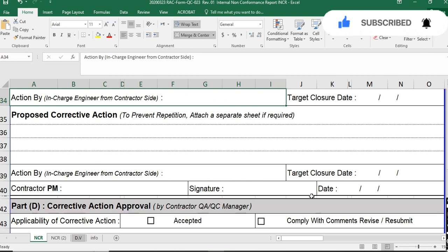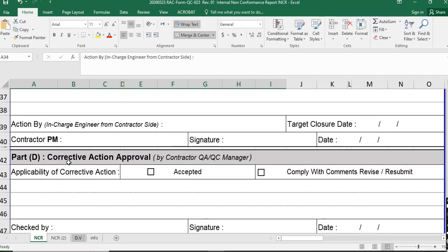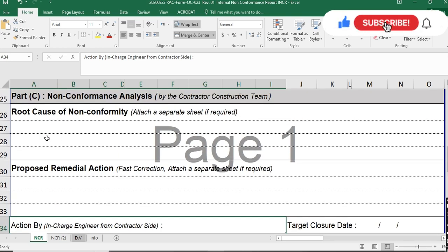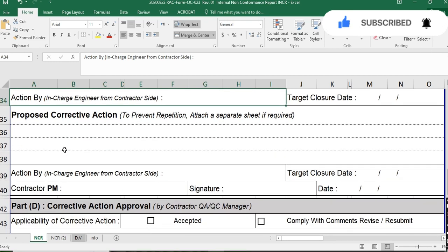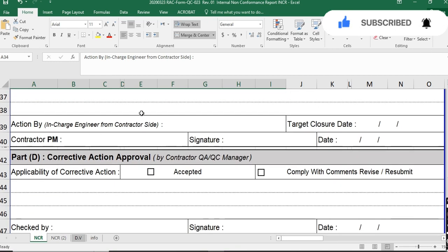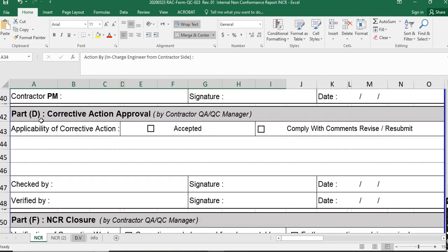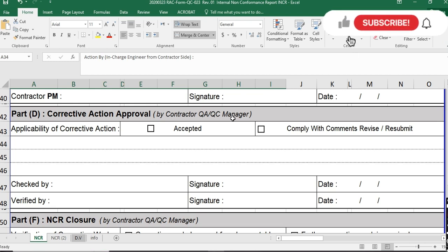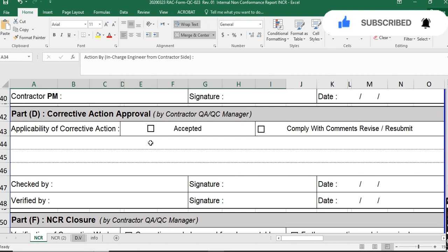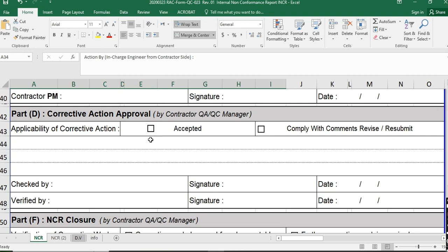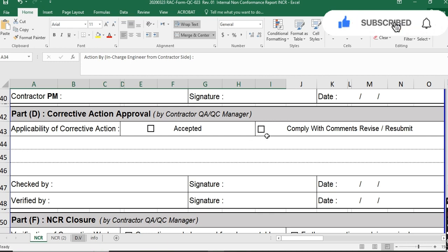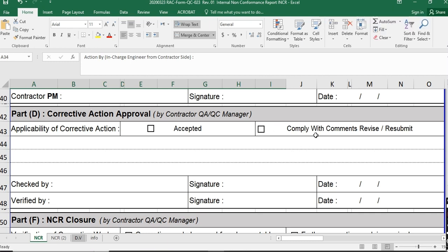Part D is for corrective action approval. When the construction team has written the root cause, proposed remedial action, and corrective action, they send the INCR back to the quality team. The QAQC manager reviews it and selects: accepted, comply with comments, or revised and resubmit. If the corrective actions meet the quality management plan and specifications, you accept them. If there are comments, you send it back to the contractors to resubmit and comply.